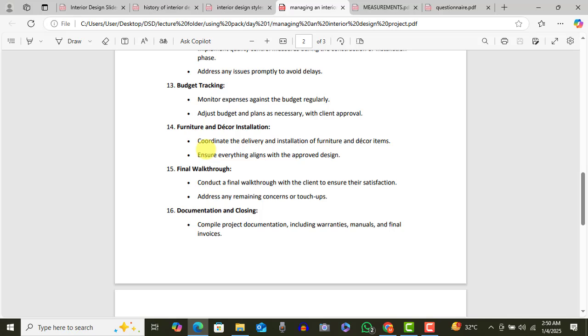If we have gone over, then something somewhere in the budget has to be reduced to make up. If we say we are using this for furniture, have we overspent? For painting, have we overspent? For landscape, have we? Be sure you are tracking everything, not just spending. Otherwise, before you know it, you've eaten into your fees, which is your profit.